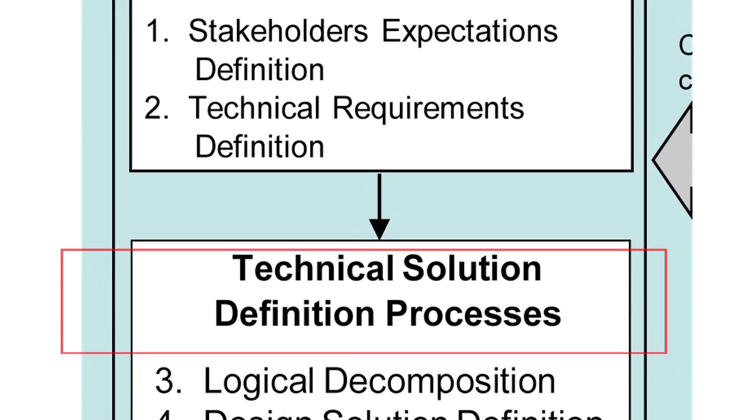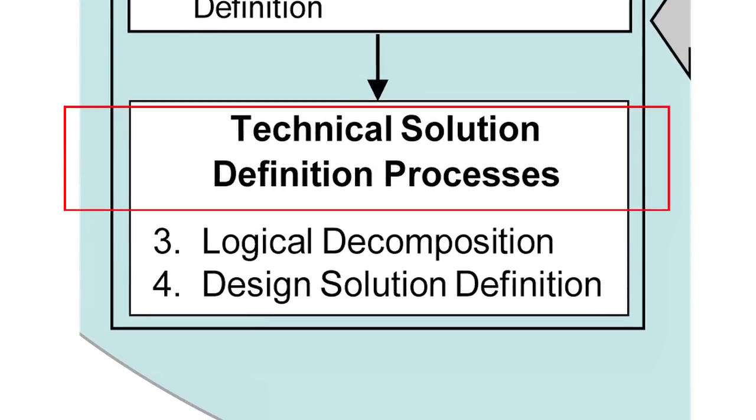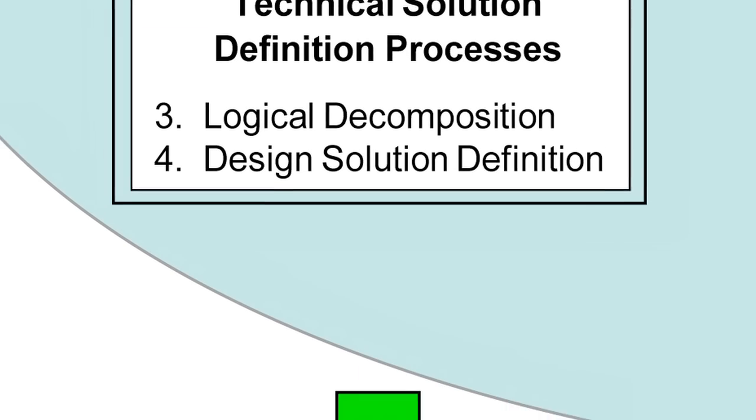After defining requirements, steps 3 and 4 look at defining a technical solution. Having requirements alone won't give you a spacecraft — you need to do drawings and concept analysis. You figure out that you need a battery for power, thrusters to keep the satellite in orbit, and start laying out systems, subsystems, and components in a hierarchy so you understand at the lowest level what everything needs to do to make the system come to fruition.